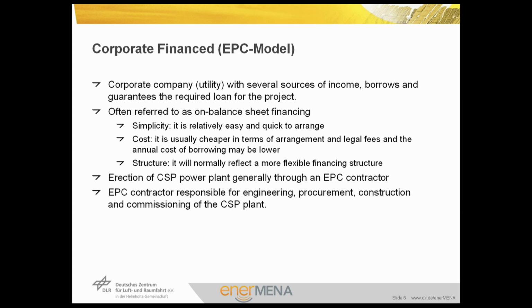Thirdly, erection of the CSP power plant is generally through an EPC contractor. And finally, as the term indicates, the EPC contractor is responsible for engineering, procurement, construction, in addition to commissioning and handing over the power plant.